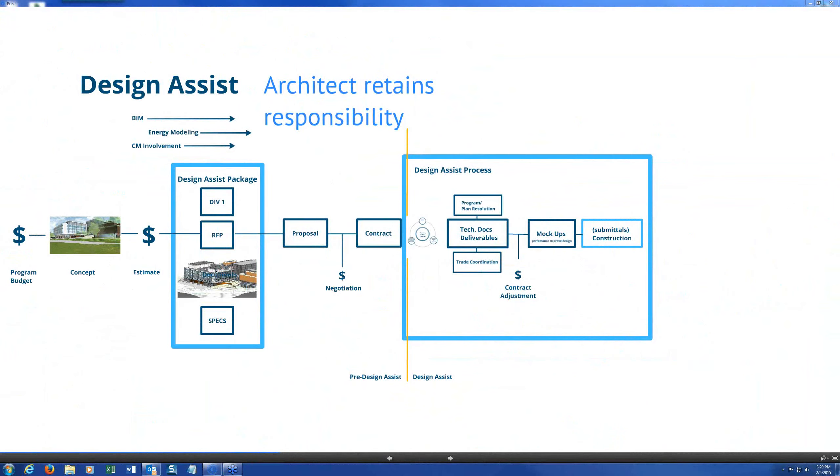Again we need to see this in context. It's not a matter of kind of after-the-fact assignment. It's something that develops as the design is developing, and we get to the point where we are in basic agreement with the CM on, let's take curtain wall as being one of the most common factors, the basic profile, the basic type of curtain wall, is it a true exterior pressure plate system, what kind of glass is in it, what are the performance criteria that we want it to match, what's the aesthetic criteria that we want it to match. And once those things have been documented, then when the subcontractor comes on board, gets a subcontract before the construction documents are finished, then we can work with them.